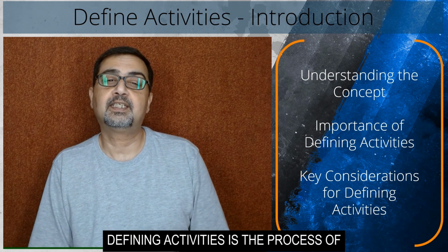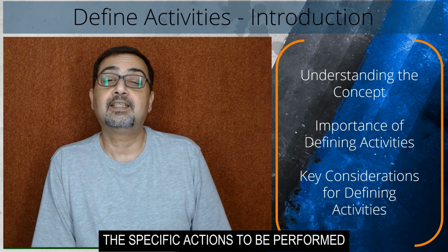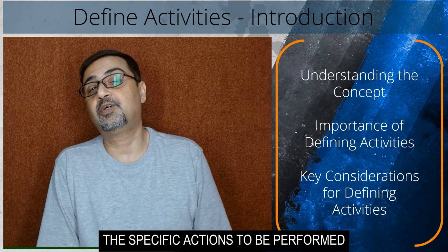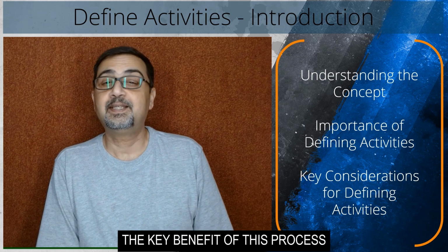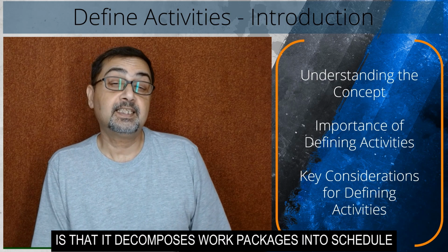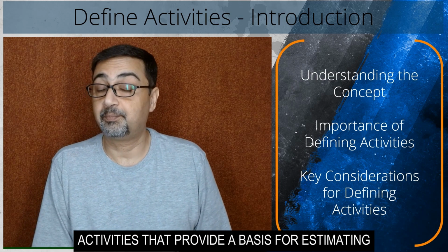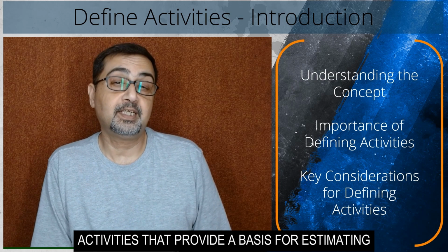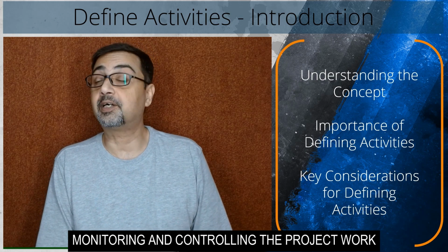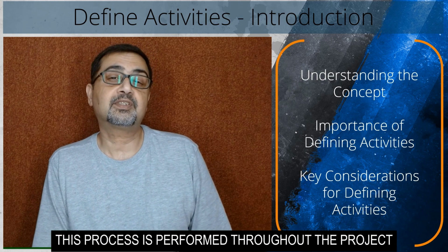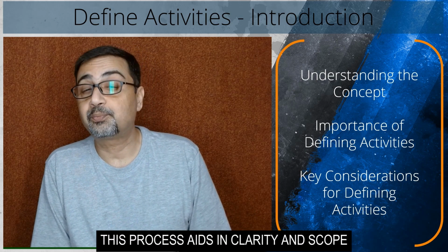Defining activities is the process of identifying and documenting the specific actions to be performed to produce the project deliverables. The key benefit of this process is that it decomposes work packages into scheduled activities that provide a basis for estimating, scheduling, executing, monitoring, and controlling the project work. This process is performed throughout the project. This process aids in clarity and scope.